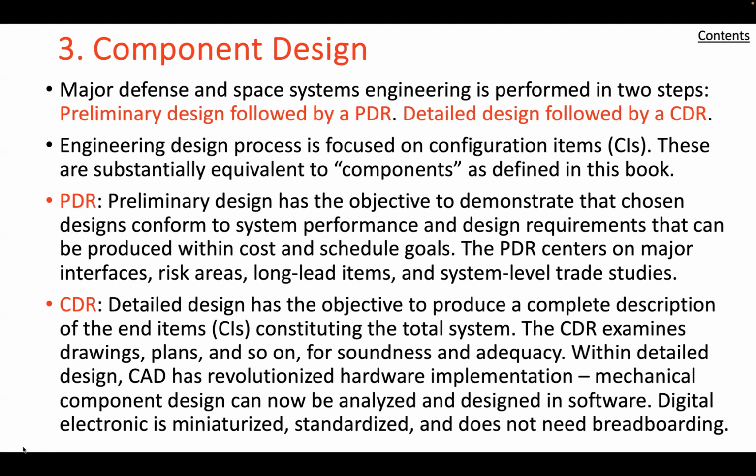Well, let's now think more formally about the preliminary design review. In government programs, the preliminary design review, PDR, is normally conducted by the acquisition agency to certify completion of preliminary design. For major commercial programs, company management acts in the role of the customer. The process is frequently led or supported by a commercial or nonprofit systems engineering organization.